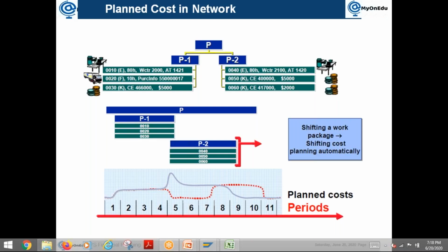So as long as investment project is concerned, the schedule what you are representing is basically the contractor schedule, how the contractor is going to execute, that you are replicating in your system just for the monitoring purpose and controlling purpose. Whether whatever the contractor agreed earlier, is he following properly. If you want to monitor that, then you need to have a schedule in your system.